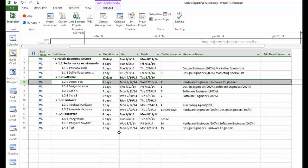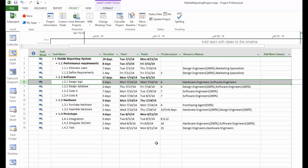Now we are ready to save this project plan as our baseline. The baseline of the project will provide the planned schedule and the cost for this project to be compared with the actual schedule and the cost. And this baseline makes the tracking of the project or the task tracking possible.